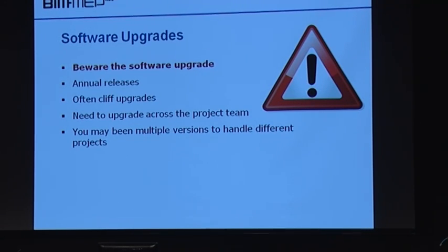It's bad enough in the design cycle. It's even worse in the construction cycle because you could be dealing with a 4 or 5 year construction sequence and you may be dealing with 4 or 5 versions of upgrade on that project. Then if you contemplate that you have to upgrade all of the files. So it's not only all the model files that all your contractors have generated, but all the architectural and all the services files, the design files, have to be brought up to date as well. So it's a significant problem. Don't underestimate it.